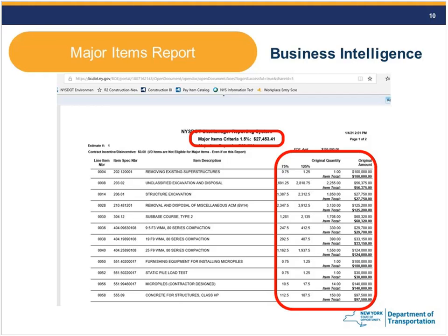And again, we are only concerned about this when you break those criteria as far as changing the price. So if you had 100 of some item, and let's say it's a major item, and you installed an extra 10, so you've installed 110, you still need to run some type of change order, either a field change payment or a regular change order to pay for those 10 units, but you don't have to renegotiate. So there's a difference between looking at it to renegotiate it and just addressing it with a change order to be able to actually pay for it with the contractor.